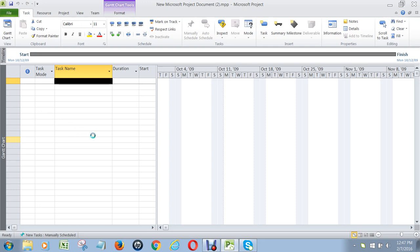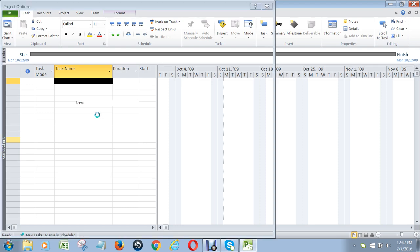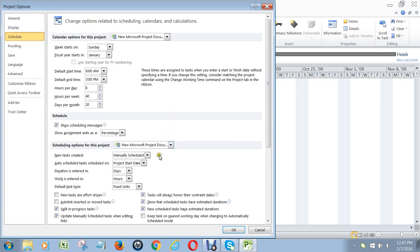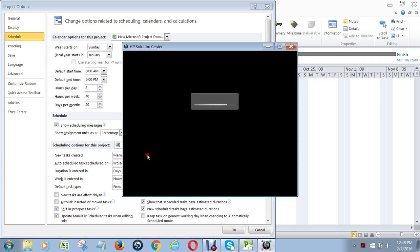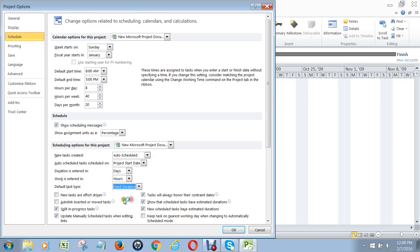Up comes a screen, and on that screen what you do is you make sure that by default all tasks in the task mode are what are called auto-scheduled. When they're auto-scheduled, what that means is that Microsoft Project will automatically set the dates that tasks start and finish without you having to enter those in yourself. So we go here to auto-scheduled to make sure that new tasks are always auto-scheduled. We also go here to make sure it says fixed duration and that this is unchecked — new tasks are effort-driven.